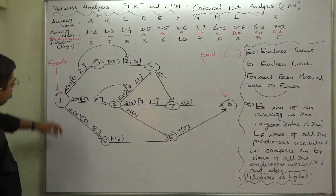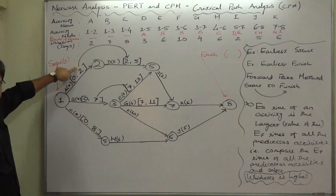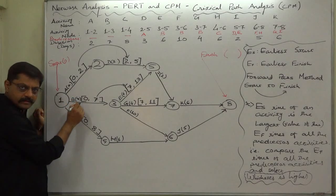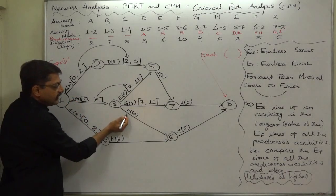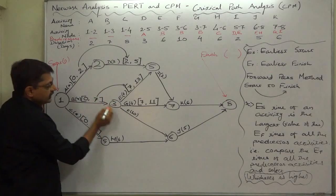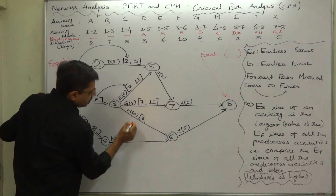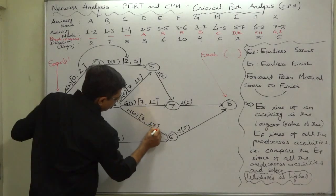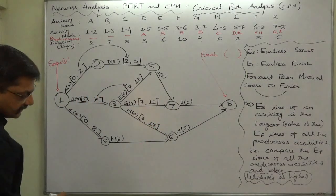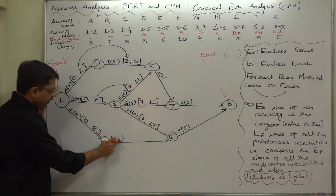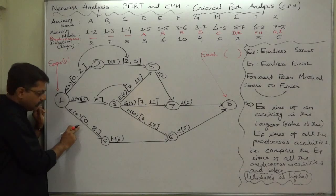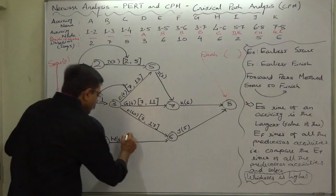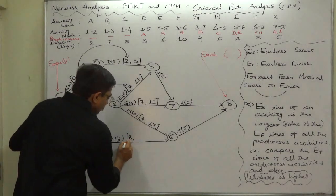In the square bracket, the first value is earliest start time and the second is earliest finish time of the activity. For F also there is only one predecessor, B. When there is only one predecessor, the earliest finish time of the predecessor becomes the earliest start time of the successor. Earliest start time plus duration will be the earliest finish time: 7 plus 10 = 17 for F. In case of H also there is only one predecessor, C. C ends on the 8th day, so earliest start of H is 8 and earliest finish time is 8 plus duration.